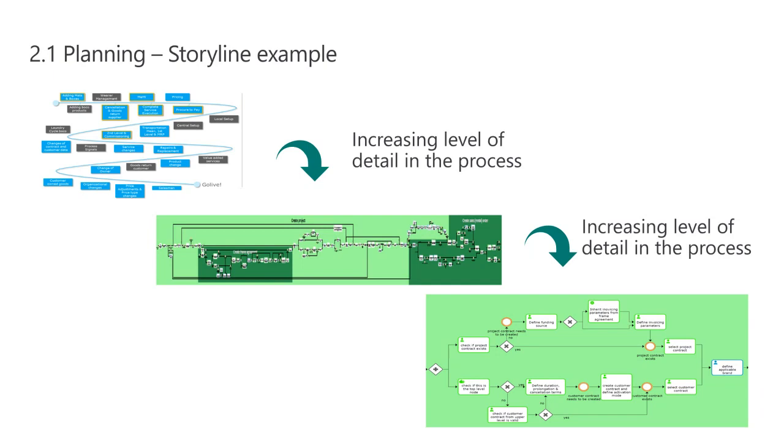And then you can start saying, okay, I'm going to chop up this storyboard into 5 sprints or 6 sprints or whatever you end up being. And you're saying, I'm going to go all the way through first, and then I'm going to add some of the more complex items in the black boxes in sprint 2 or sprint 3 or sprint 4. So it starts to give you a view of how your business process delivery will look like in the sprints. And then your process diagrams or your process flows start to get more details as you go through.